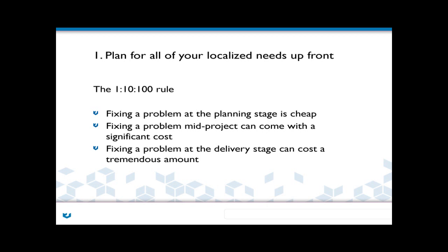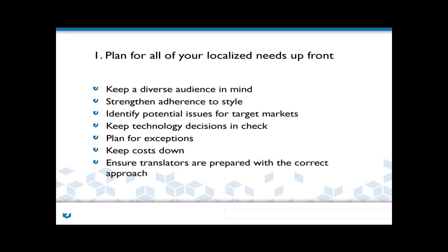We see a lot of things where we go back and forth with some of our clients about, is the content final? Is this the exact thing that you want to say in these markets? Yes, yes, yes. Do the translation, come back, do a full layout, and we're all set for 19 different languages, and then they come back and say, we really want to change this one thing. Well, now the change needs to happen in X many places, so however many languages you have. So catching it beforehand saves a lot more money, and the further up the chain that you catch it, the cheaper it becomes.